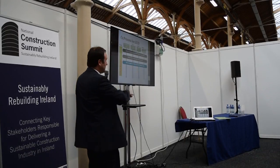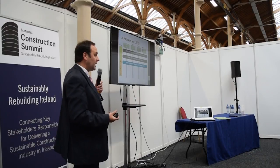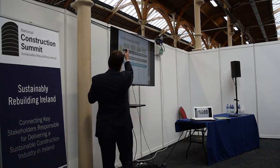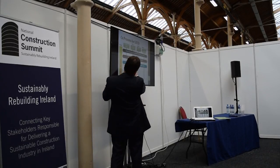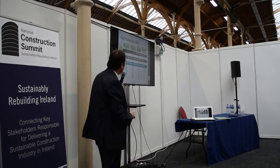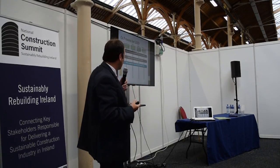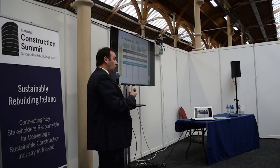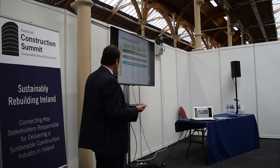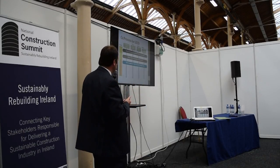So the actual process for LEED starts then through the initial design, there's the detailed design development, through the construction, and through owner occupation. So there's the 4 phases. If you're doing fundamental, there's certain specific requirements: enhanced path 1, monitoring-based, or building envelope commissioning as well. The key part is to get the commissioning authority on board early, engage them early, and if you're tendering it out, look for options in case the project doesn't go forward, so you can actually get them to construction phase and to tender phase then with each of the fundamental and enhanced options.